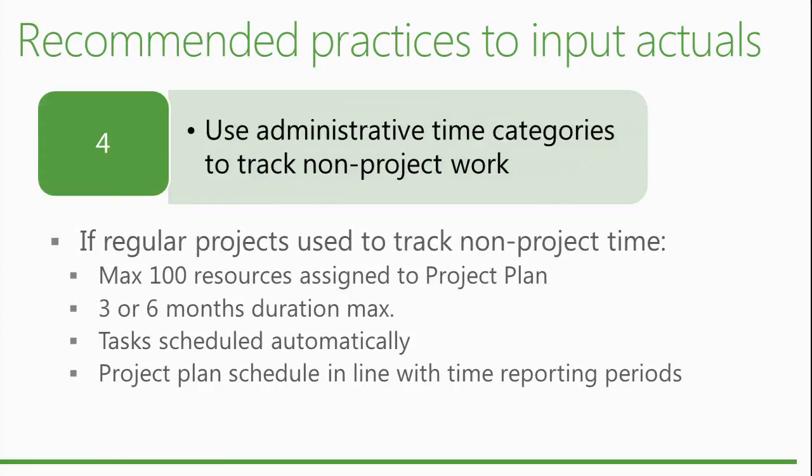The idea behind it was, okay, you have a project that goes by phase, and you can define the first phase in a pretty good way, at the detail level, but you don't know what's going to happen after that. So you just put a bunch of things, and some of the things you have no clue. You put some notes. In the date field, you can say, okay, talk to so-and-so to find out what's going on, or you can put TBD.